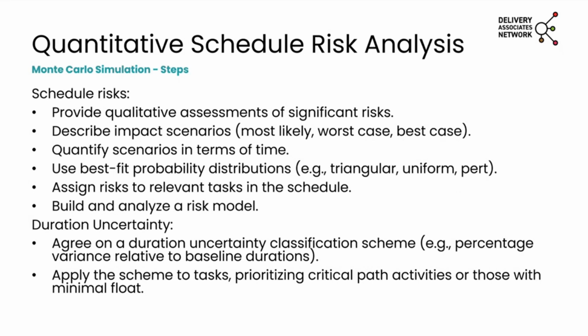Again, using the Monte Carlo simulation, very similar techniques, different software. Schedule's always most complex because you've got dependencies on each activity to another, where with cost items, again, you have dependencies and correlations which you can model. But when you run schedule risk analysis, you've also got links in the logic and milestones and stuff that carry other stuff forward. So it's a bit more complex to model, and you would need different software.